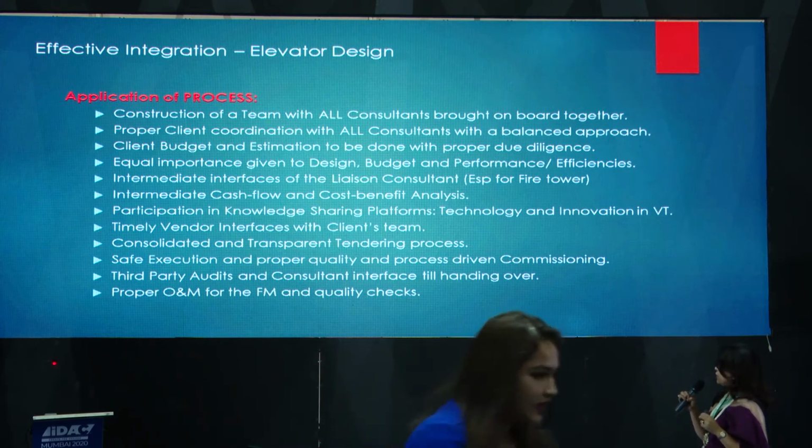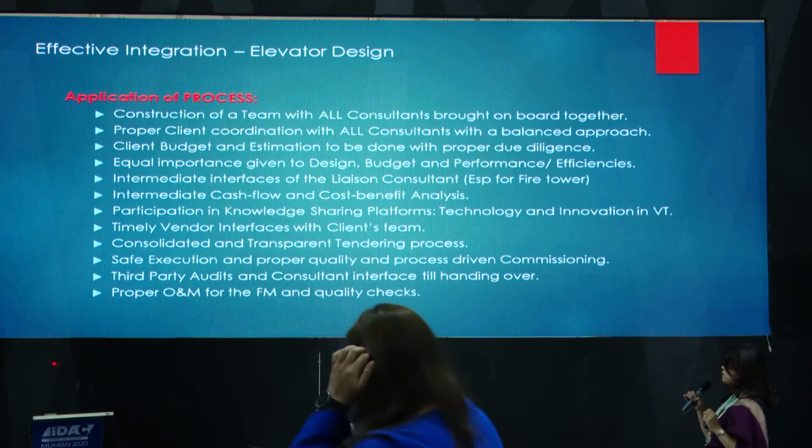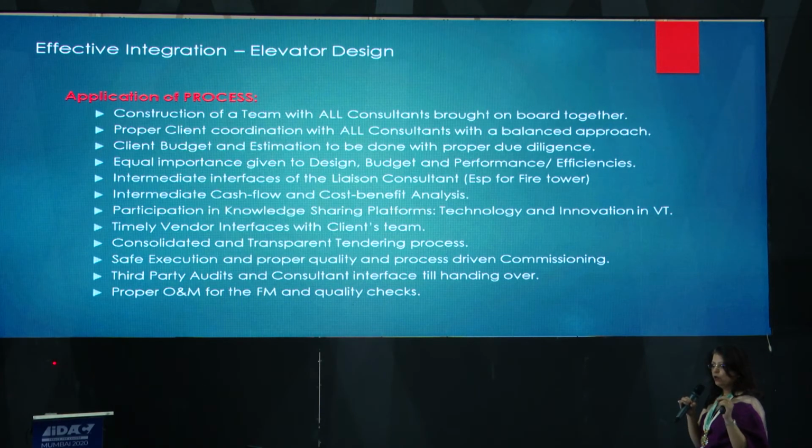Safe execution and proper quality and process-driven commissioning, and third-party audits and consultant interface till handing over. So it's not like you've designed, okay, now I can just do my own thing, work with the manufacturing people, and the consultants are not really required. You need them, in fact, till the final audits are done. And of course, the last, quality checks and proper O&M.